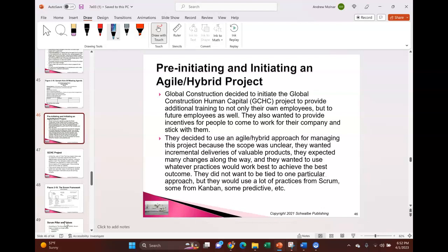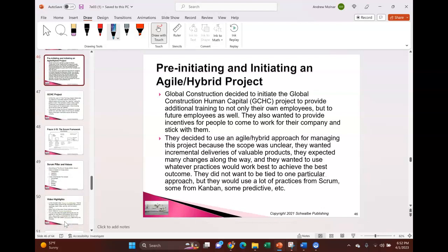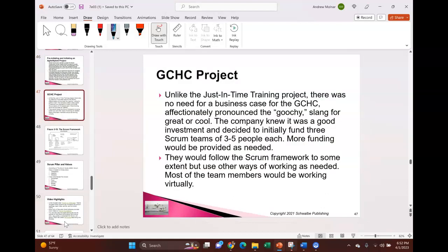Remember, we talked about a lot of projects being hybrid projects. And so, they give some examples in the book. And one thing from Agile I take into my waterfall projects, my predictive projects, to manage risk, is I bring my daily stand-up. And actually, I take from my assumptions log or my issues log, which gets updated every night based on new issues we've found. And I start the meeting by briefing the issues and who I'm assigning them to and where I think they bucket, so we can all be in agreement. That's how I run it. It's kind of a hybrid approach.